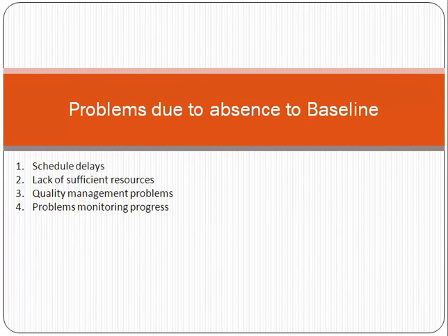Similarly, you planned that the project should be completed with $6,000, and after 2 months you evaluate it and realize that the project can never be completed with $6,000. We need $10,000, for example. So that means you are over budget, you are spending more than what you planned, and you need to revise the baseline here.